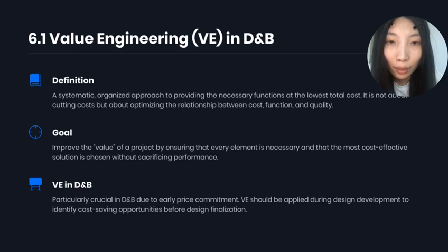However, VE can also be undermined if design changes happen too late or too frequently. Late design changes may destroy earlier cost-reducing ideas and force teams to adopt poorer or costlier alternatives. That is why VE must be supported by stable design, governance, and good coordination, so that value decisions remain consistent throughout the project.